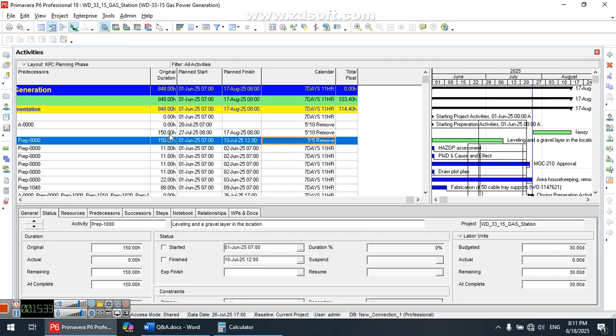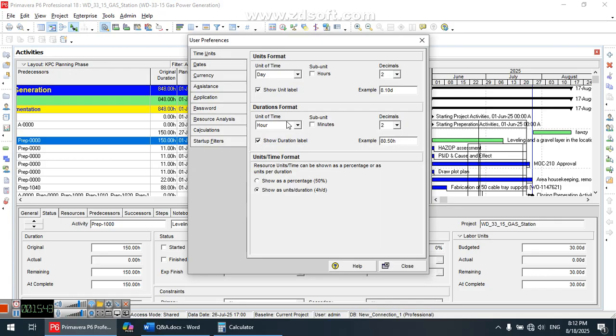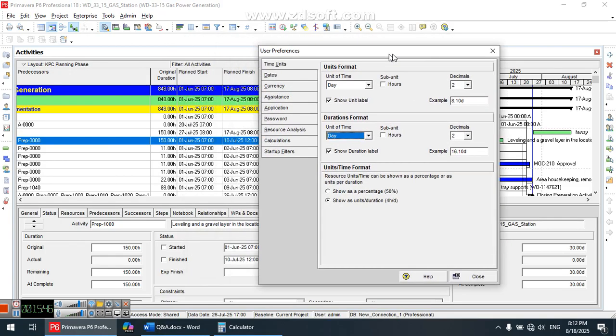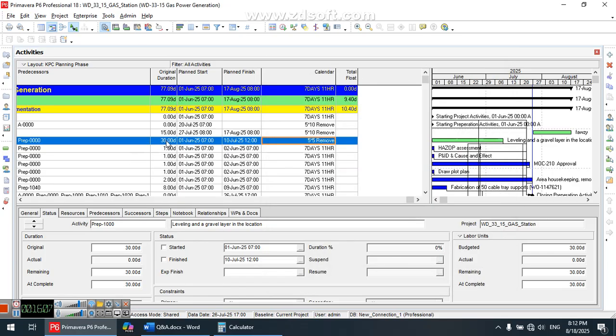So let's convert it from here, 150. Let's convert it to be just days. What is the answer? Here 150 and working per day is 10 hours, so it will be 15. And here 150 hours and working hours per day is 5, so 150 divided by 5, it will be 30. Let's see, 15 and 30. Okay, let's do another thing.